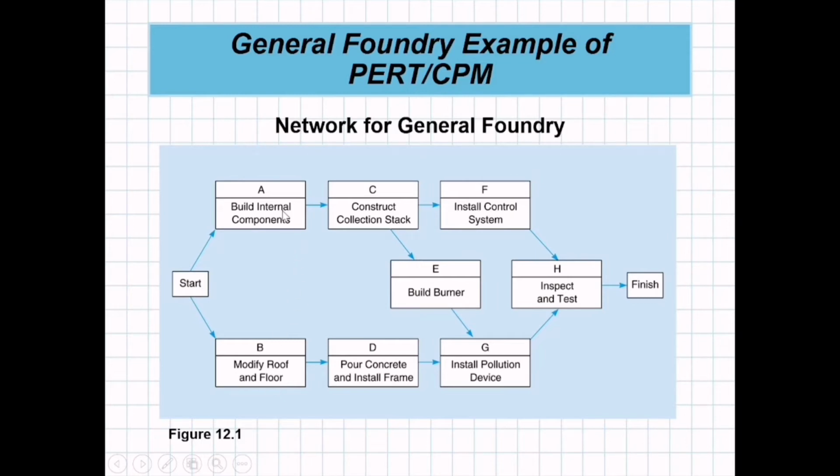Then, after activity A, you should construct collection stack. So, activity A is the predecessor for activity C, as we've discussed earlier. Meaning, class, you cannot proceed with activity C if you are not done yet with activity A.